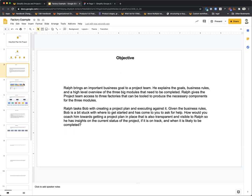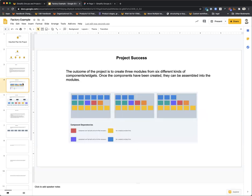Given the business rules, Bob is a bit stuck on where to go and has come to you for help. How would you coach him towards getting a project plan in place that is transparent and visible to Ralph so he has insights on current status, whether it's on track, and when it's likely to be completed? There are three modules, each requiring color-coded components from different factories. A red component cannot be built until all necessary yellow components are done first, and a purple component cannot be built until all necessary blue components are done first. Orange and green are independent — they can be built by any factory at any time with no dependencies.